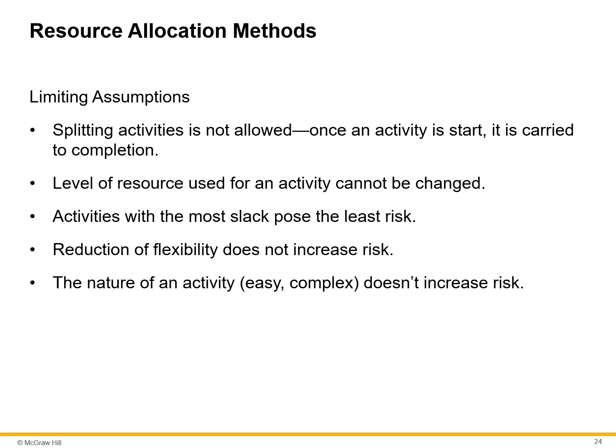Second, the level of resources used for an activity cannot be changed. These limiting assumptions do not exist in practice, but simplify learning. It is easy for new project managers to deal with the reality of splitting activities and changing the level of resources when they meet them on the job.